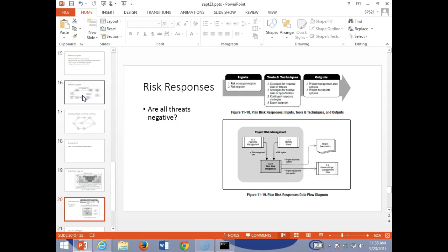Starts getting a little involved. But the reality is, if we came out here and we said, well, we think it's going to take 100 days to build this project. And in a lot of cases, contracts have punishment clauses. So if our construction company had to pay $1,000 a day in a fine because that project wasn't done, would that motivate me then to have risk responses and to bid better? Very likely.